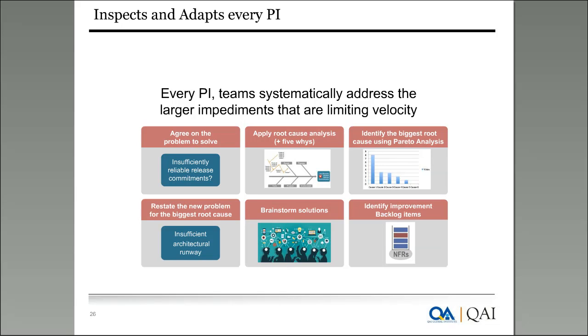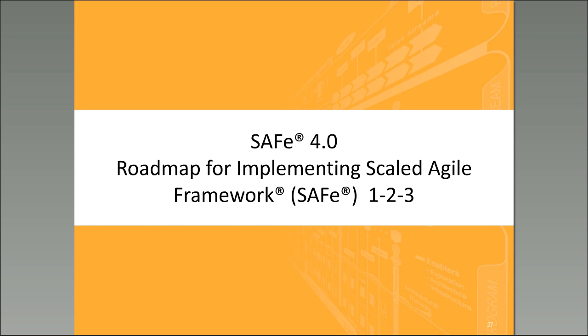So do a root cause analysis for some of the points, and if there are some technical or architecture issues, those get resolved, and people identify non-functional requirements here, and any other challenges that come in get addressed, okay, and also the plan for the next program increment. So this repeats. So that is how typically the Scaled Agile Framework works with multiple teams, right? So that is what we have seen so far, right?